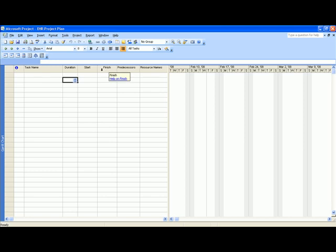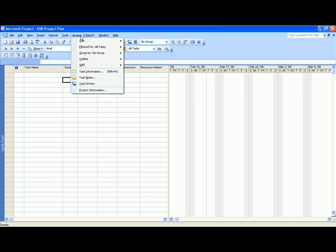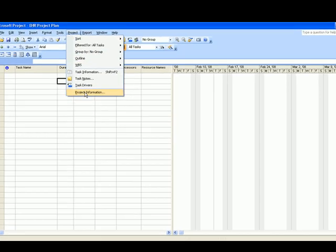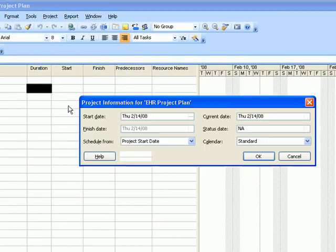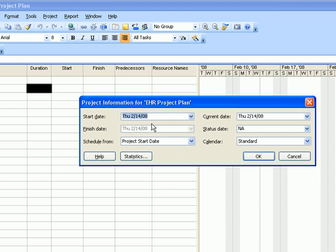The first thing we'll do for our new EHR project plan is to include a start date for the whole project. So let's click on project, select project information and make sure that you have today's date, which is February 14th, 2008 on the start date text box. Check and see if all the information are correct and then we'll click on OK.